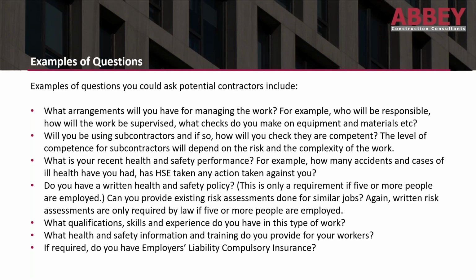We asked for an example risk assessment, and the example risk assessment we were sent was the dismantling of a coal bunker. Absolutely nothing at all to do with the work in hand. So that was rejected, and we went off with another request. We did that 3 times until we finally got one which we could review against the requirements of the project we wanted them to undertake and follow. So it's definitely worth doing that.